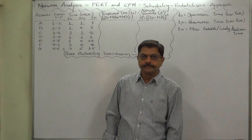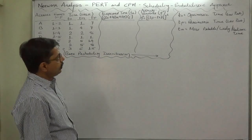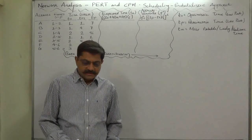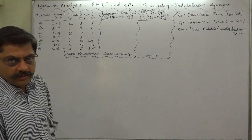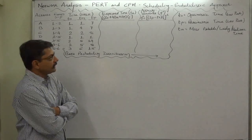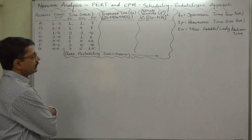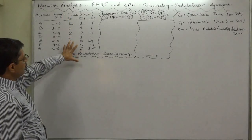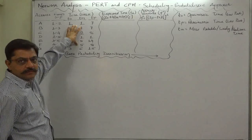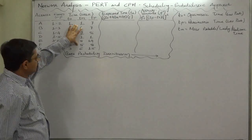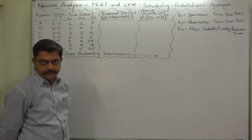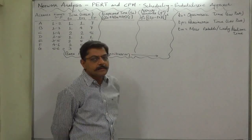Hello, namaskar and welcome to network analysis of PERT and CPM. We are now with a new case of scheduling using a probabilistic approach. This case is particularly of PERT, but we have to use the critical path for the purpose of various calculations. In this kind of problems, the beta probability distribution is assumed so far as the time consumption of various activities of the project is concerned.